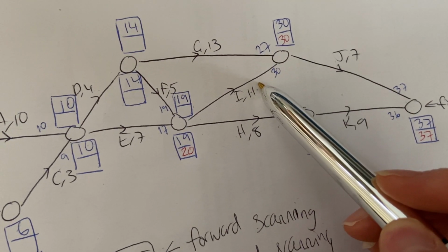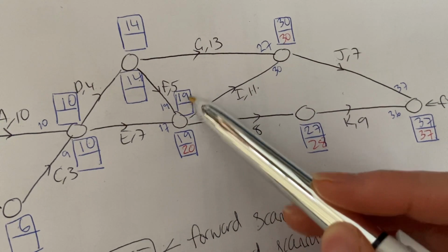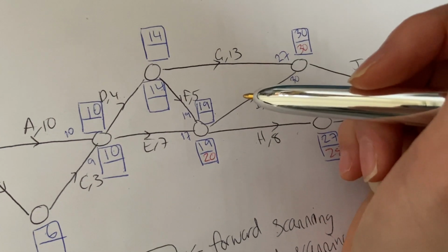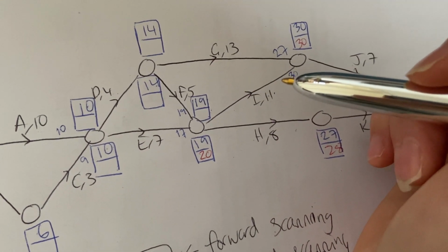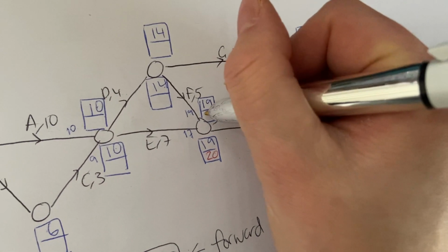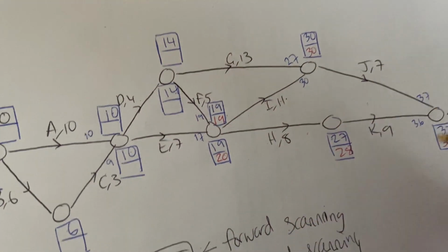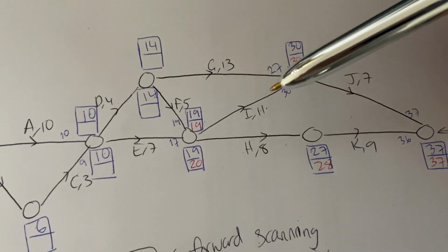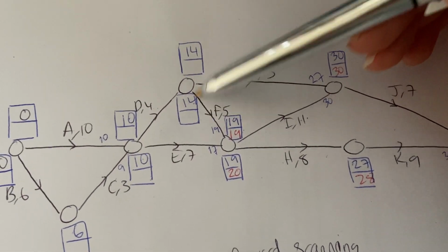And then looking at I, look at the box to the right of I at the bottom. 30 take away 11 will give you the box to the left of I. Remember, this is the box for I. So it's 19. Sorry, my brain is... that? It is, yes. Right, so that's done so far. We're about halfway through.